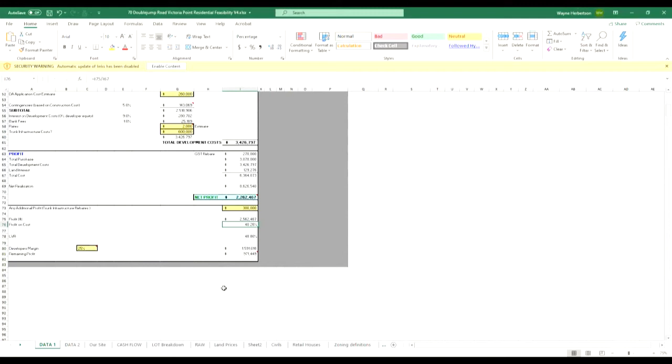So what's your profit margin? 40.26%, as I'm highlighting here now. Where is it? Oh, 40%. 40.26%. Profit on cost. Profit is 2.5 million, and your cost is total development cost, 6,364. Cost. Okay. Yeah. Okay. So is that profit and go up to that? So your 40%.